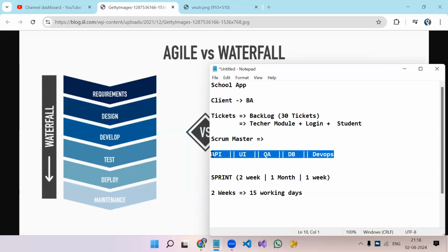If you are in a small company, you might have the habit of dropping a mail before starting your day, like, "I'm not coming today." But when you are working in agile methodology, you need to specify your leaves before starting the sprint. Let's say your sprint is going to start from next week. Whatever leaves you are going to need, you need to explicitly tell them, apart from sick leave, because we cannot be sure about sick leave. But if it is a planned leave, you need to specify it upfront. Like that, the Scrum Master will plan our work.